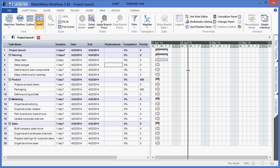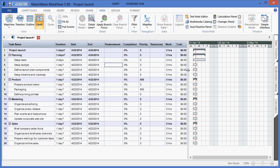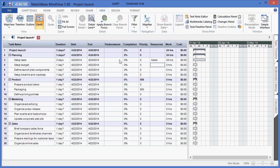I also have the ability to apply further task information such as a resource for a specific task by left-clicking in the resource field and typing the desired resource name. If I need to create a predecessor or dependency between two tasks, I can simply choose to left-click and pull down with my mouse, and drag and drop the corresponding line to the desired task and create that standard finish to start dependency.